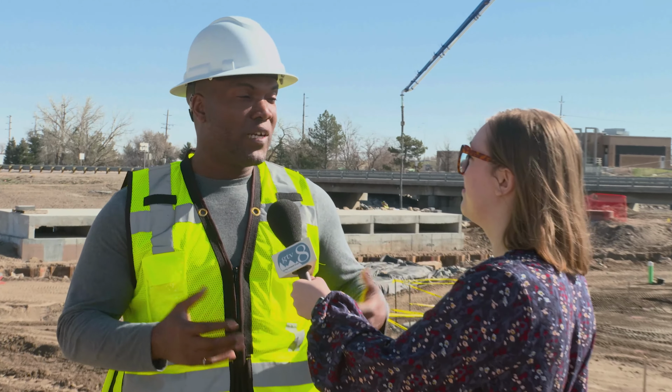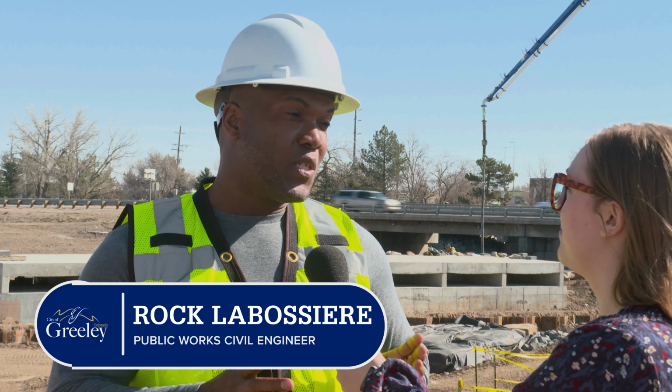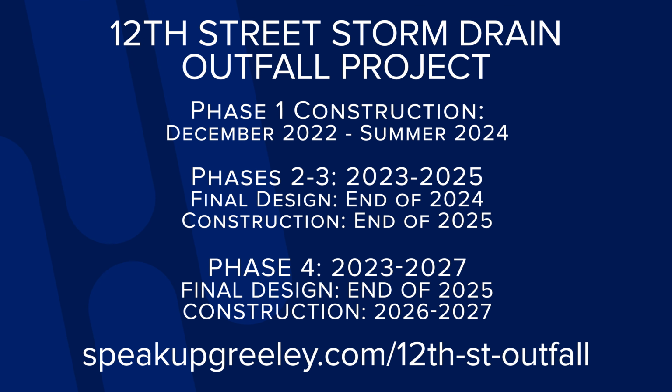Well, the 12th Street Outfall project is the highest priority stormwater capital project. It entails a trunk line of 18 blocks through the basin, protecting the downtown area and surrounding residential and commercial properties. The project will be completed in an estimated 15 to 20 years, and it's divided into 7 phases. The project reduces flood damages on about 800 structures and removes 200 structures from inundation during rain events.